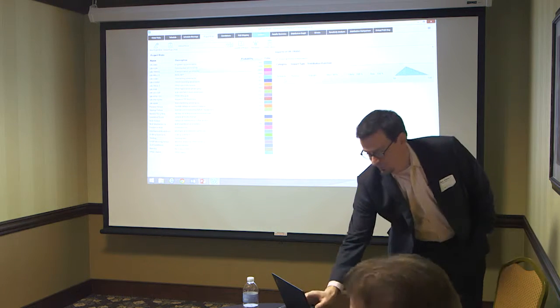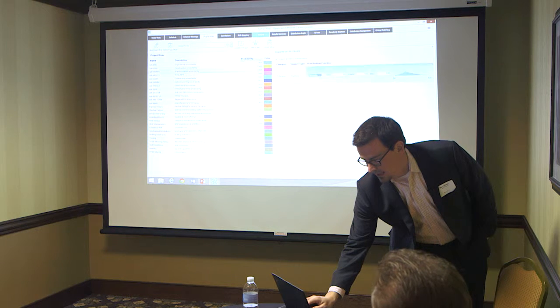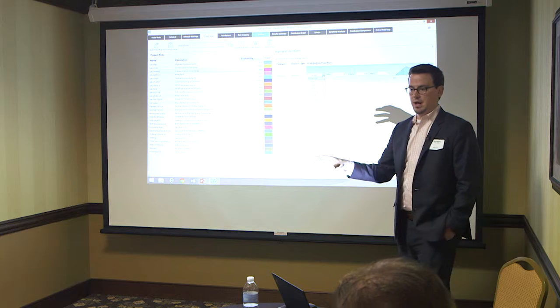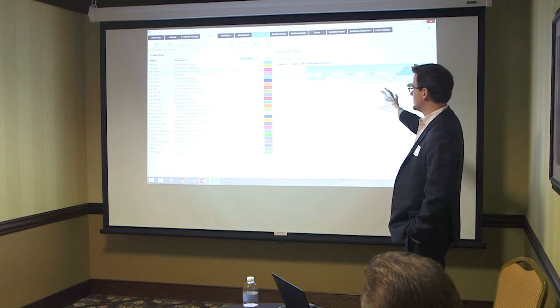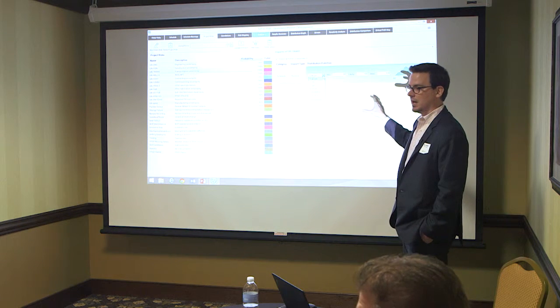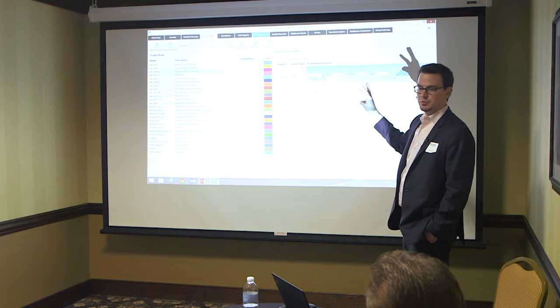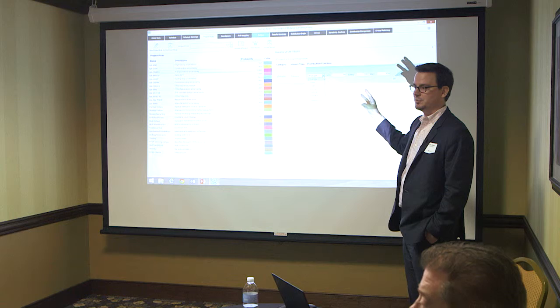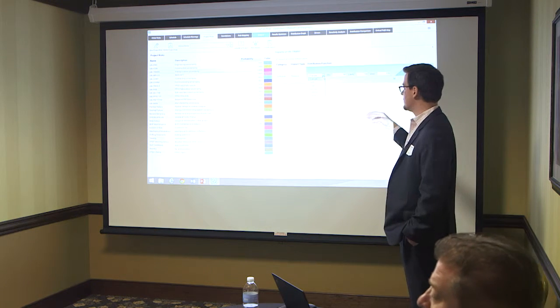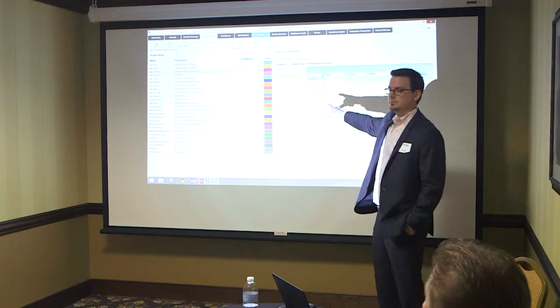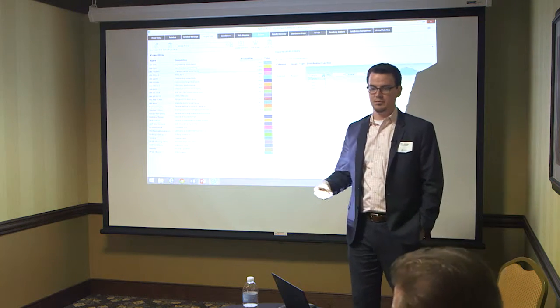From a distribution perspective, again, our approach is to focus on the high value and leave the noise behind. So we've captured the key distributions we found customers were using. I'd say probably 95% of the time, no one ever used anything different than triangle, trigen, or uniform. Those are the most common ones we've seen. If you've got more data and you're more sophisticated, you've got cumulative and discrete to build your own as well. So you can build your own distributions if you've got the data.